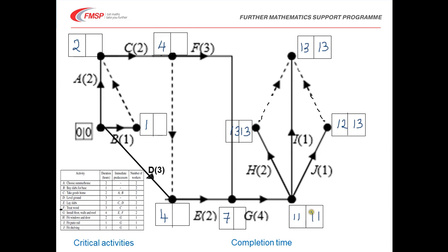11, and so forth. So again, we've got 1 arc going out, so that's just going to be 11 take away 4, which is 7, and so on. So just be careful that you do work on the basis that it's arcs going out. So you've got the 1 arc going out there, so that's 7 take away 2, which is 5, and so on. So we'll work all the way back and just check that you can complete your backward pass.